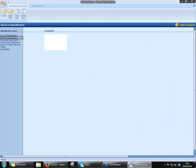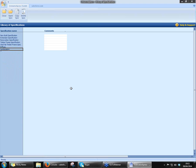So we'll come out of the specs. You can see there's a couple of different ones here — we've got new build, extension, renovation. We've got prefab timber frame and site fab timber frame. We've got one for offices and one for landscaping. The main differences between the specs: obviously if you're doing a new build, you're going to use bigger plant like a JCB rather than a mini digger, maybe on site for a longer amount of time using bigger skips. Obviously if you're doing an extension, you'll probably use a mini digger, less plant on site, so on and so forth.